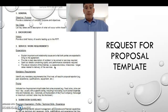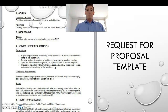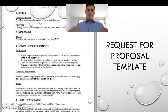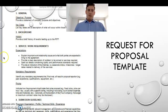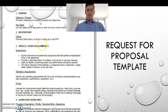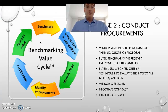Here is a basic template from Google showing a request for proposal. You have to provide a basic overview, your dates of when work needs to be started and completed, background, expectations, requirements, pricing, and submission guidelines, with more detail further in the document. Now, conduct procurement - phase two.